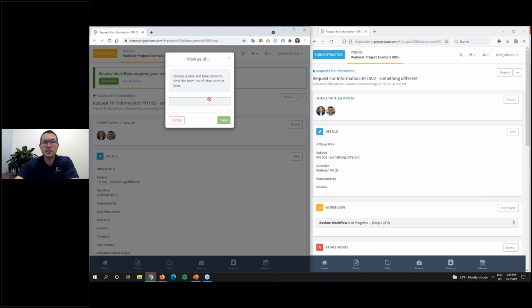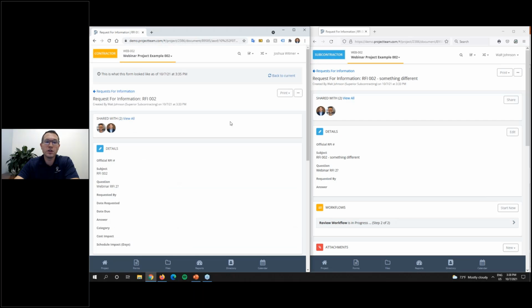What you can do as any user is go to the view as of. So I can say view as of, and I can go to a previous time and day for this information. So I'm going to say 3:35, which is just a couple minutes ago. Now, as Josh, I'm viewing this same exact RFI, what it looked like a couple minutes ago before Walt made that change. And I can see the subject looked a little bit different. It didn't have that something different on it. It just looked like RFI 002.